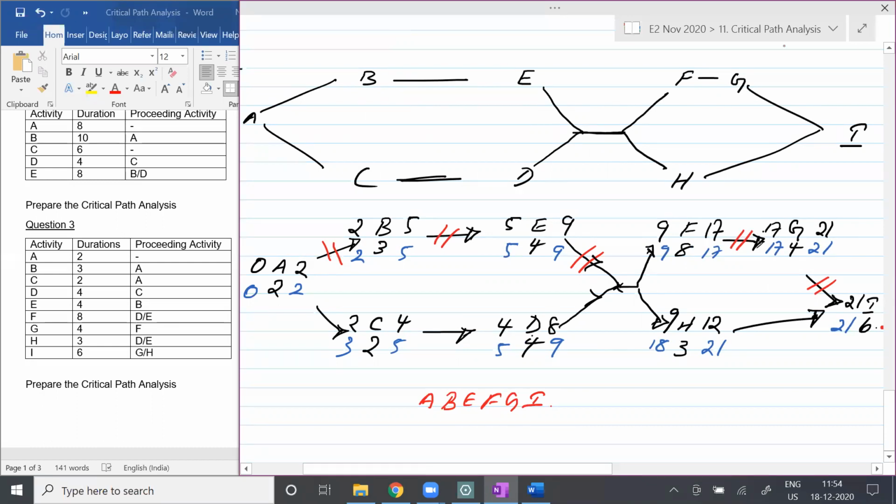Can we just do the slacking areas also? Yes or no? So here, if you see, you can finish it by 4 days or lately finish it by how many days, students? 5 days, right? So there is a slack of how many days, students? 1. Do you observe that, students? Are you clear with that, students? Yes. So in H we have slack of 9. Correct. And H also there is a slack of 9. Thank you for telling that. Fine with that, everyone? Yes or no?